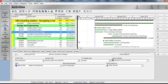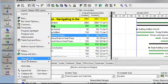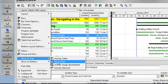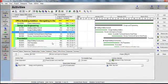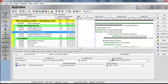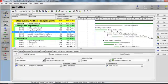Let's begin to discuss the options for what you can display on the top layout. I'll go to my Layout Options bar, Show on Top, and the first option we'll select is the Gantt Chart view. The Gantt Chart view consists of the activity table on the left, which displays your activity information in columns, and the bar area or Gantt Chart area on the right, which is a graphical display of activity progress over the duration of the project.